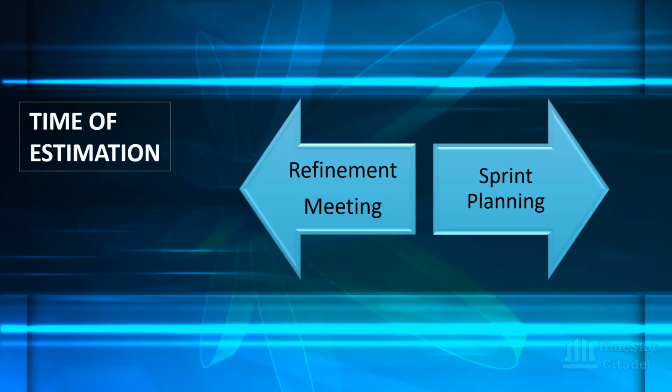If nothing new comes into it, you as a scrum master, just to get confirmation, will be asking them to say, okay, so we've done all this estimation during refinement meeting. Are we still okay with those refinements? BAs, did we add anything to the story? PO, has anything new been added to that story that has changed the scope from what it was when we were doing the refinement meeting, that we want to think about now when we're doing the sprint planning, before we commit to it and take it into the sprint? If there is, definitely you'll have to do your estimation again, get information on those new changes that have come into it, get clarification on it, and then as a result, be able to work with it.